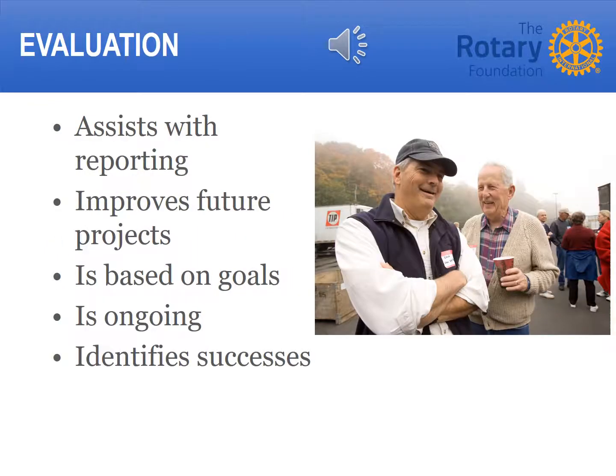Conducting an evaluation helps your club determine the success of a project and identify any areas of improvement for the future. An evaluation will assist the club with your reporting requirements. Use the lessons learned to replicate success and adjust for challenges in the next project. Review the goals. Use the goals set during the planning stage to evaluate the success of your project. The data and evaluation method and frequency should be set during the planning stage, and the project evaluation happens during implementation through completion and beyond.